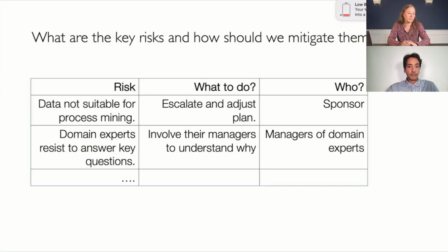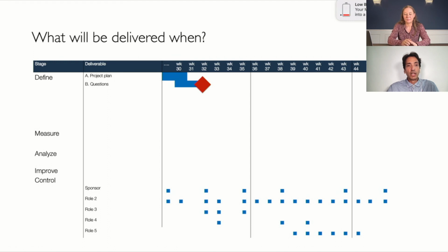So data, of course, is a risk, and I think the best way is to think about these risks in your project plan and also align with the sponsor, right? So to think about, okay, if these risks become apparent, at which stage in the project phases do we start discussing these risks? And maybe think about also the mitigation of these risks, right?